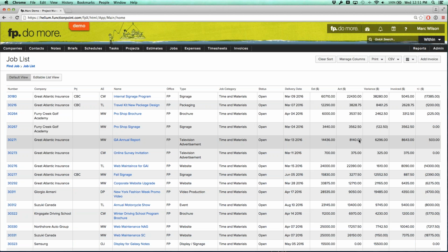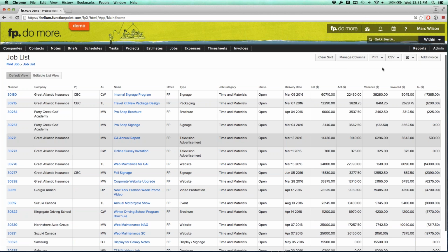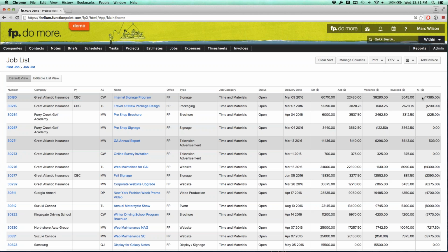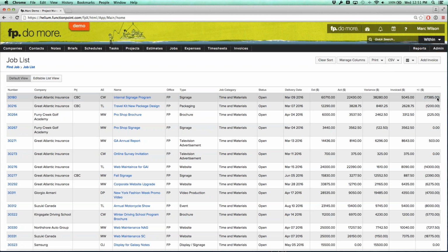Perhaps it was some sort of situation where we did a pre-bill on an expense that came in for less than we were expecting, but we just billed the agreed upon amount. It came in less because of the relationship we have with the vendor, but we're still going to bill the client as if it was a regular expense. So those things may happen from time to time, but most of the time in these time and materials situations, you're going to see a negative value.